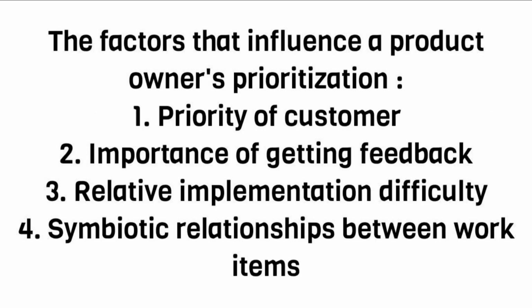The factors that influence a product owner's prioritization: 1. Priority of the customer. 2. Importance of getting feedback. 3. Relative implementation difficulty. 4. Symbiotic relationships between work items.